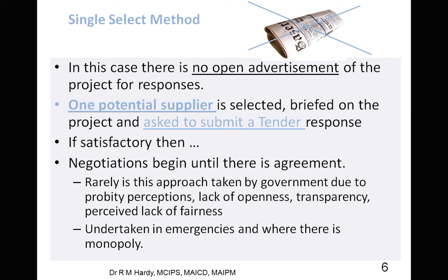But when you've got a project that's $200,000, $3,000 starts to become a significant cost within the process. So it's completely up to the client as to what they want to do. Generally, if they're that concerned about cost, then what they will say is let's get a quotation. Let's get 3 quotations. And so the default quantity surveyor is actually the builder who then puts in the price. So if they were concerned about price, they wouldn't go down the single select method. They've got to trust you and your choice of builder to go down that path.